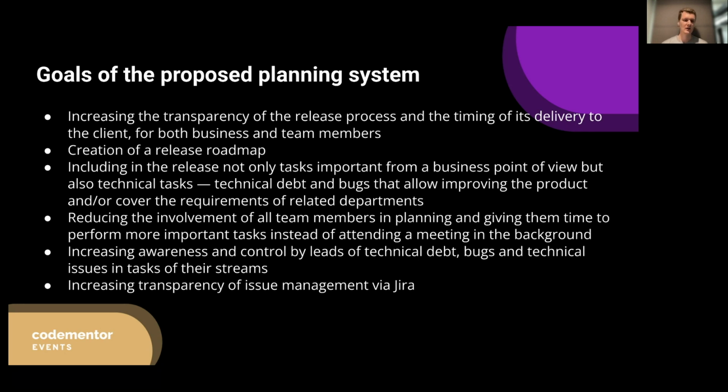I always suggest planning in advance and creating a release roadmap for your project. Even if it's a startup, I believe you could do this at least for 3 months or a quarter of a year, not for 6 or 4 years. For some projects that might be too long, but for 3 months, it could be done for almost any project, I believe.